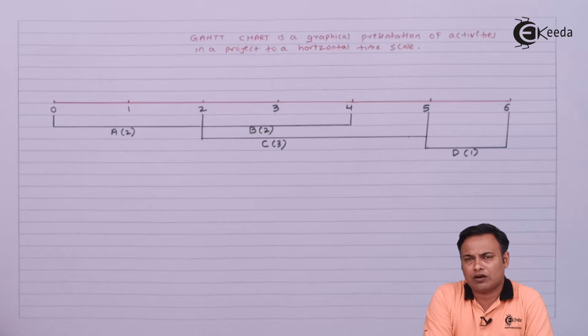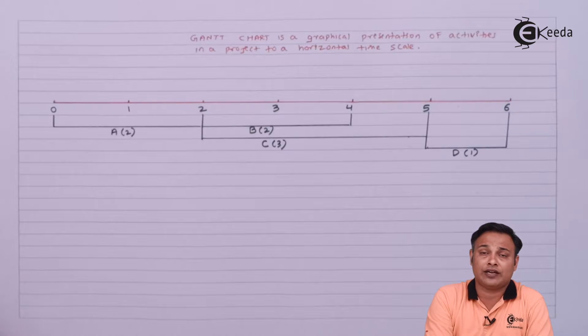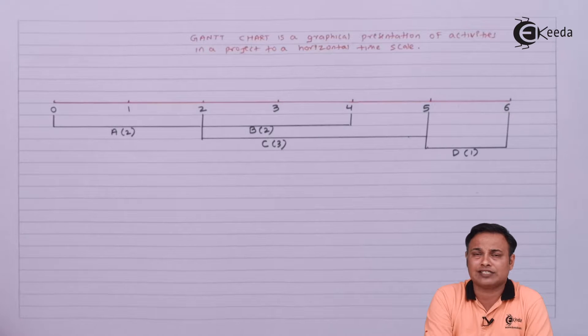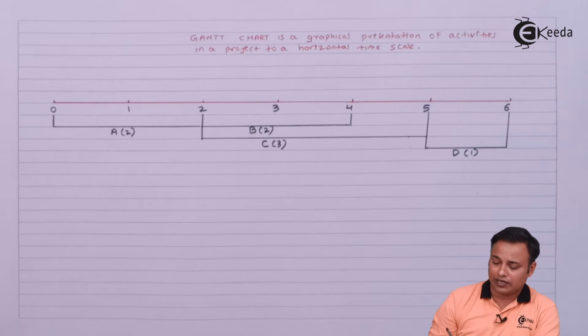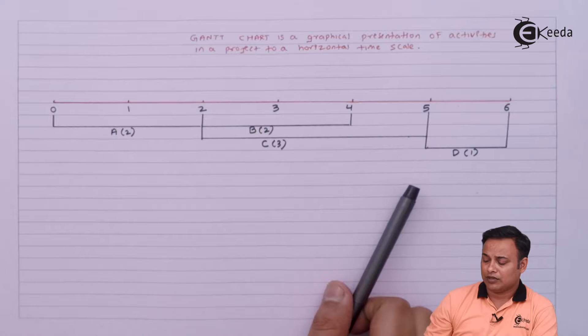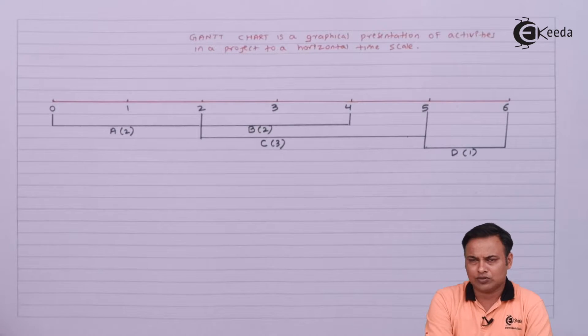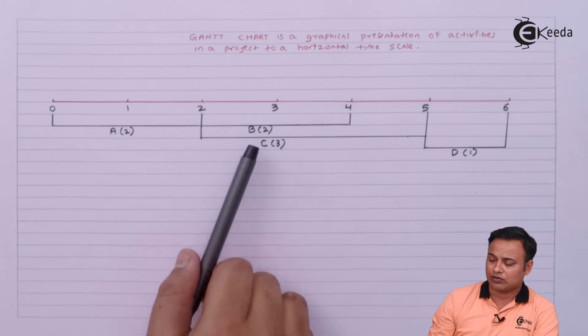What can be the probable disadvantages or backdrops of this Gantt chart? One limitation is that it does not show the interrelationship between the activities separately. I can't really pick out from the diagram which activities are linked to whom. At most I can say B and C will be carried out simultaneously.